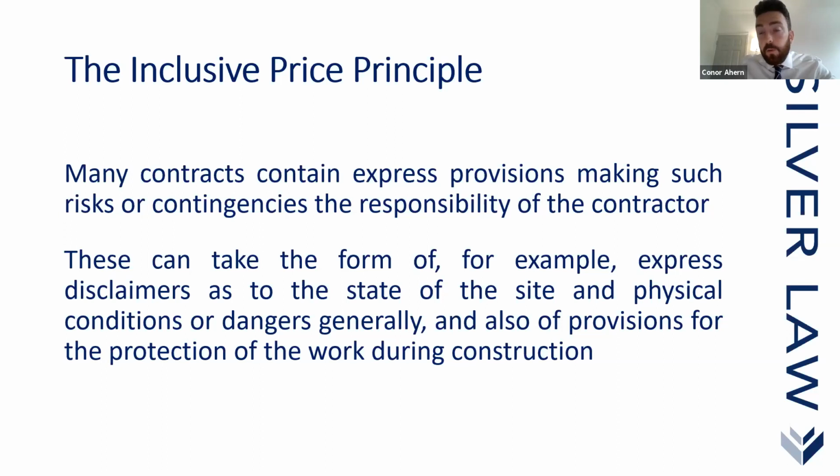But what the employer is saying is that I'll give you the borehole logs, but you're not entitled to rely on them, and if they turn out to be inaccurate, then it's still your risk. So very important in relation to the area of ground conditions is again the clarity around the employer's requirements and the contractor's proposals, but especially those employer's requirements.